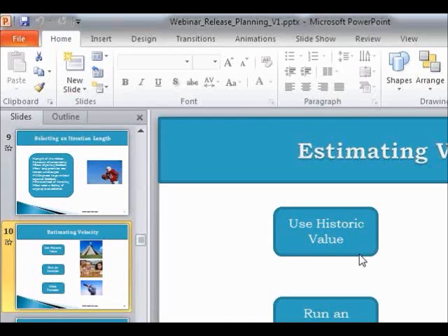What do we do if release plan objectives have dependency on other release objectives? Now, dependency management, if you can clarify a bit. For example, you may have external dependencies, where somebody else is giving a part of it, but you are targeting to get that feature included in your product in this release. For that particular case, you need to include the assumptions and risks in your release plan. And as a normal project management practice, you need to keep track of dependencies.